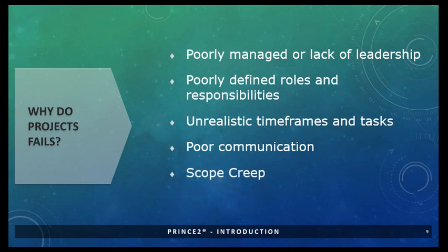And when there's scope creep, let's say one of your customers or one of your senior executives tells you to add a certain feature in some product that you're developing, since they're from upper management, you take the feature, and down the line you realize that the project will be delayed, or your project cost is going to be over budget.